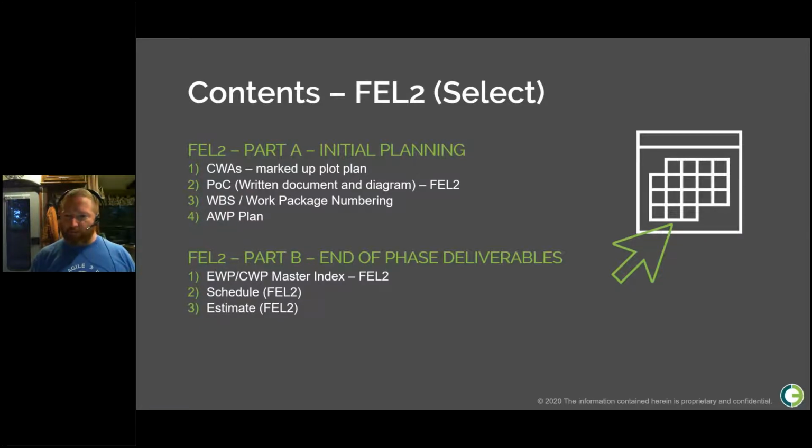advanced work packaging to make sense. Your construction decisions will have the best chance of having a meaningful impact on the project during these early stages, and any design optimizations that you do are much easier to incorporate when they don't risk extensive rework. If you have a great idea halfway through detailed design, it might be a great idea, but it might risk creating a whole month of rework for the engineers, and then all of a sudden the value's lost.